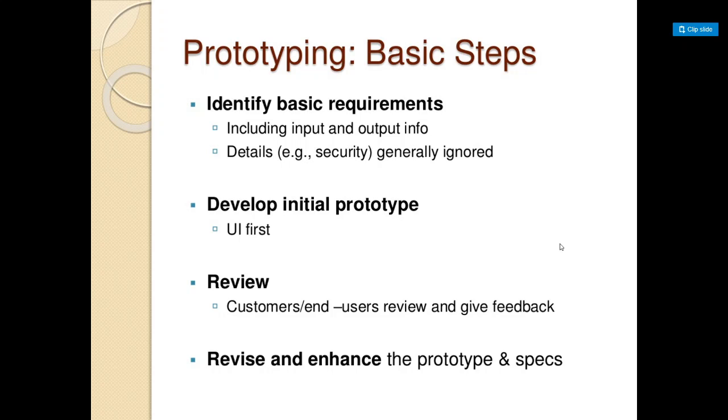So basic steps include identifying the basic requirements first. As I told you, it's not necessary to give all the requirements at the start, but some of the main requirements you can provide, like what input you are giving and what output you need, and some minor details. Usually, the details are not that big a deal. Then develop an initial prototype, that is the user interface, first.